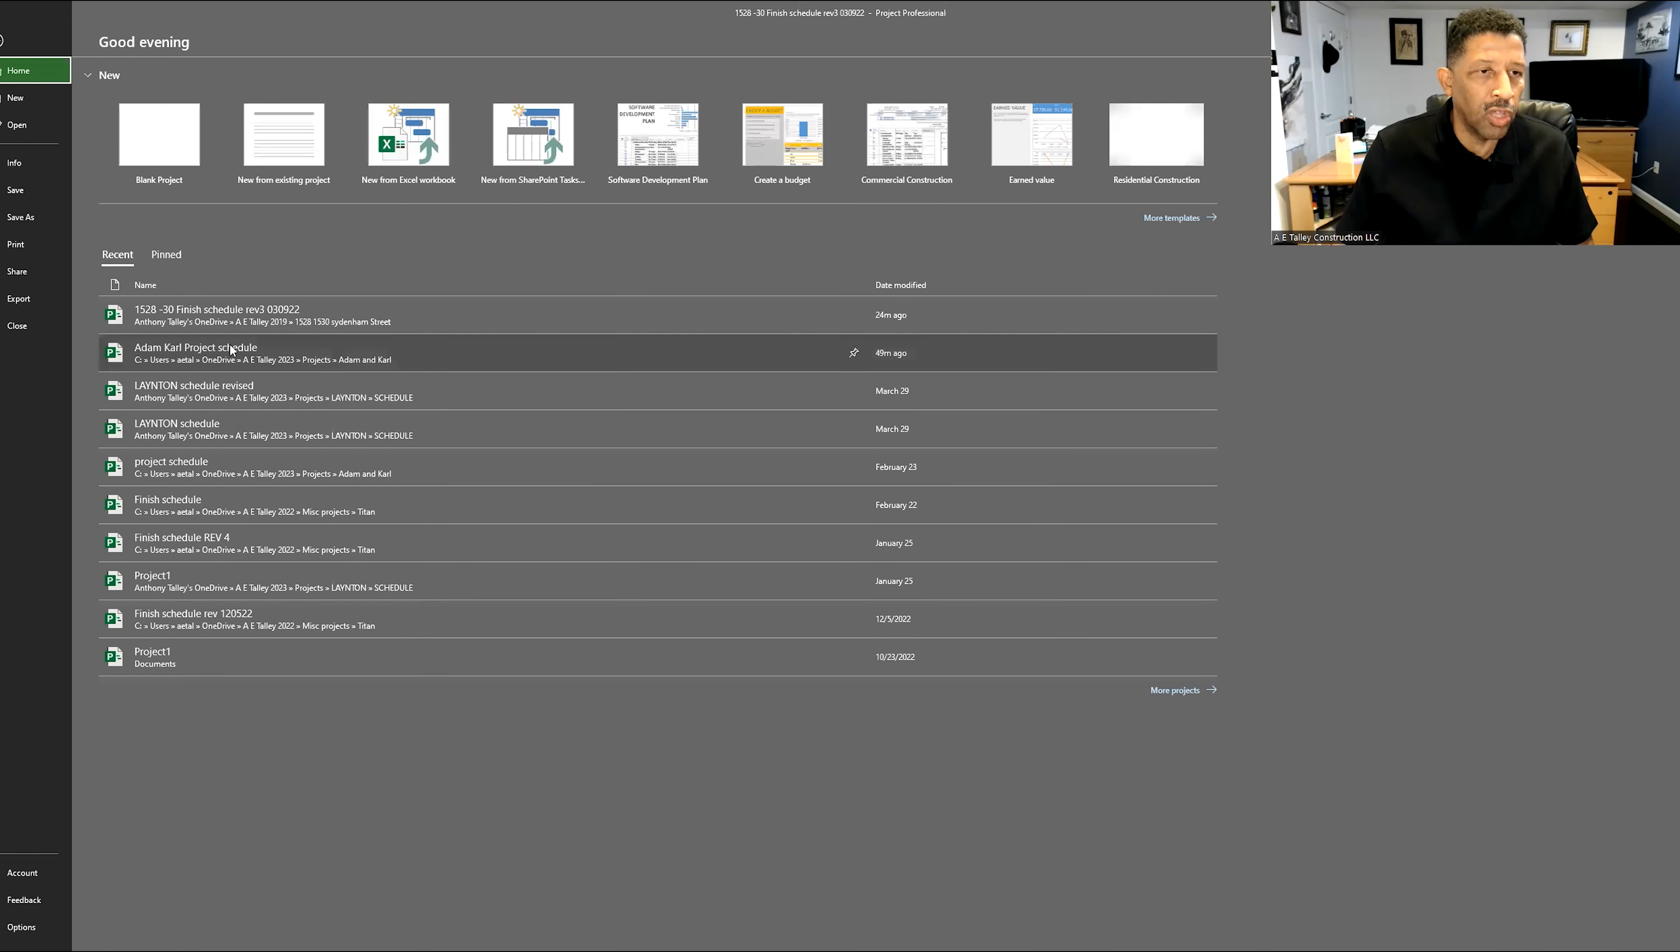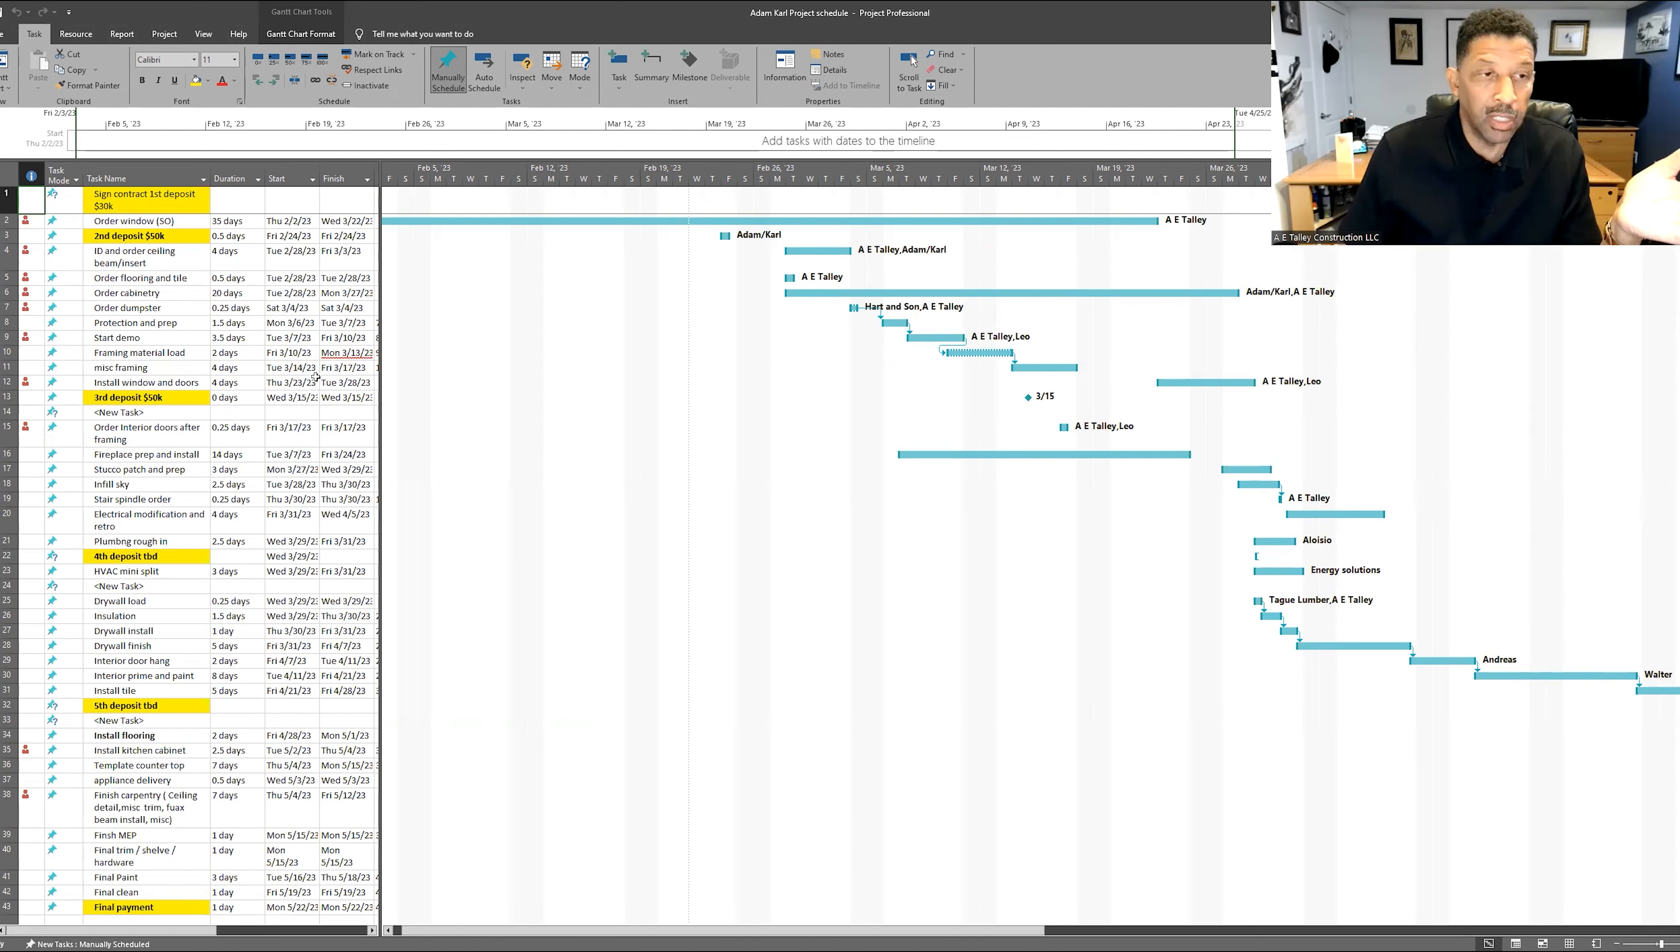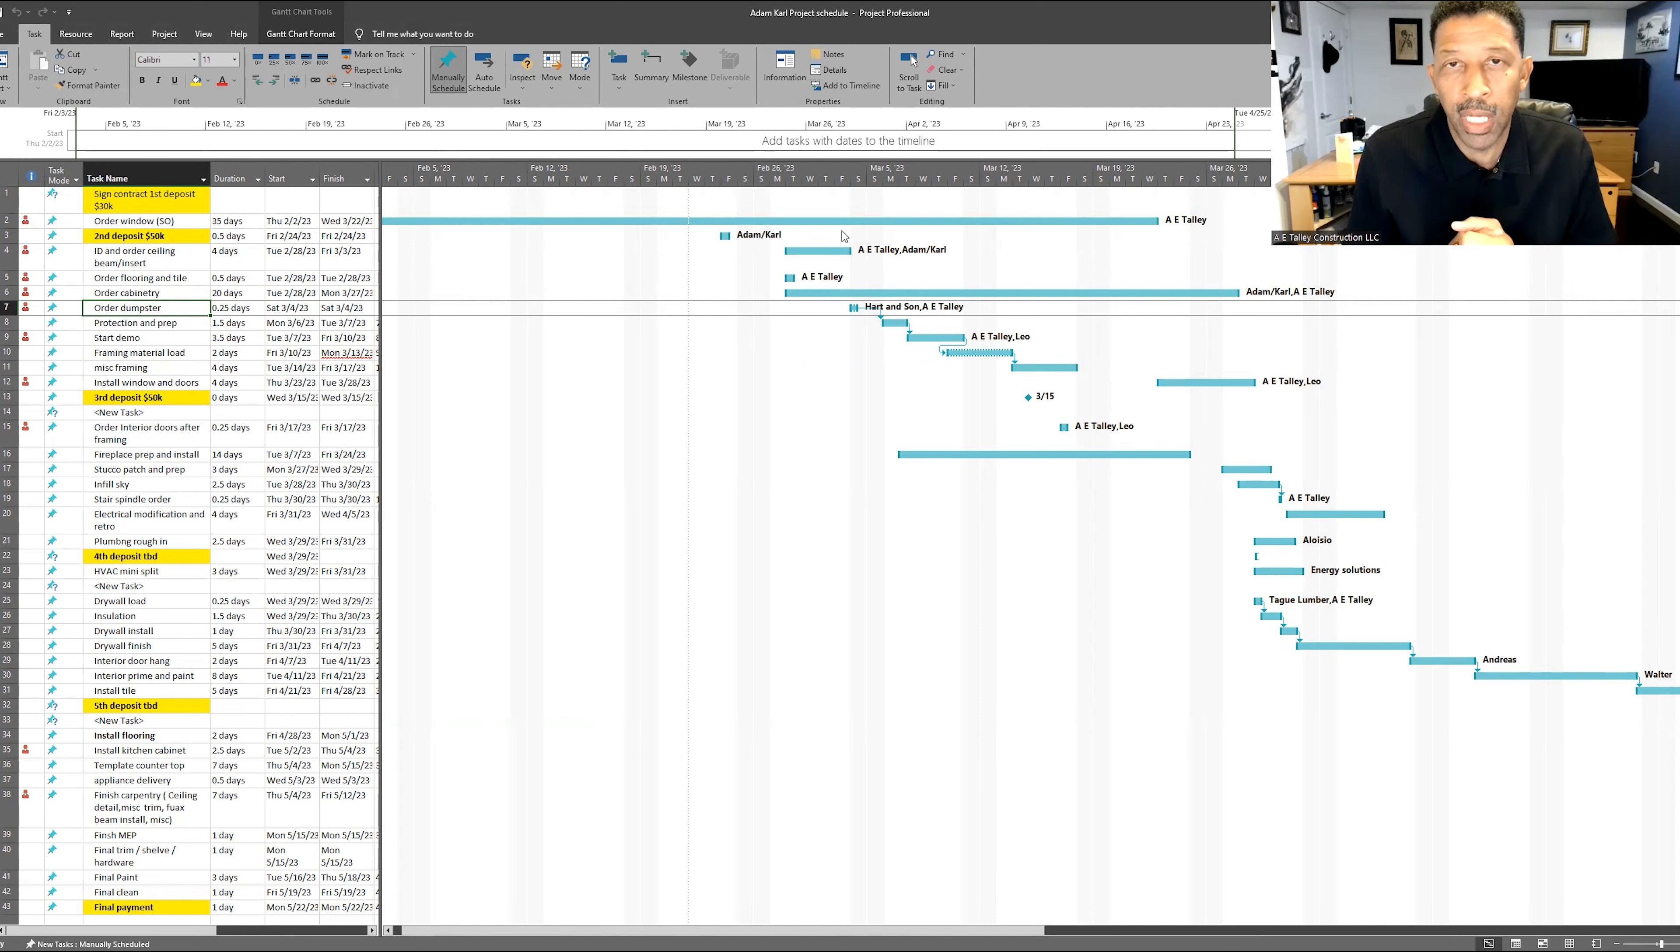I'm just going to go to another project here. This is a smaller project, okay? And on a smaller project, it's pretty big for a lot of contractors, but for us, it's a small project. This is about a $350,000 interior renovation. And what we did is we actually break it down. The initial deposit, order the windows, second deposit, beams, kitchen cabinetry, the dumpster delivery. We want our owners to know exactly what to expect at any given moment so that they're not upset with us.